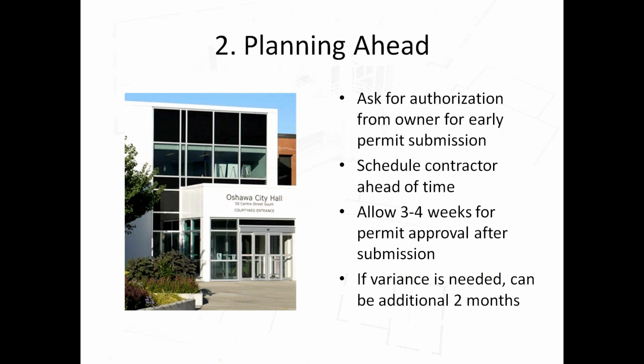In terms of applying for the permit, usually most designers will require at least 2 to 3 weeks to put together the permit drawings after going on site to measure the property. And once they submit it to the city, it would take possibly about 3 to 4 weeks before they even get back to you with any sort of indication on whether it's approved or any additional work that needs to be done. Most cities would require you to close on the property first before you can submit the application.